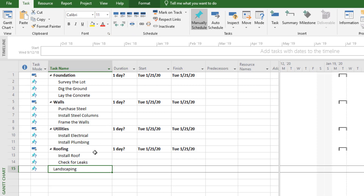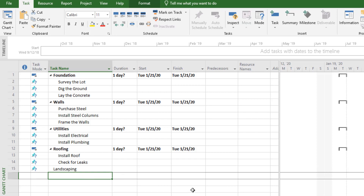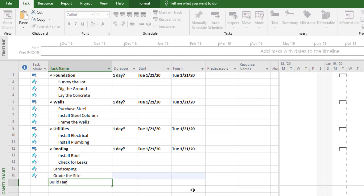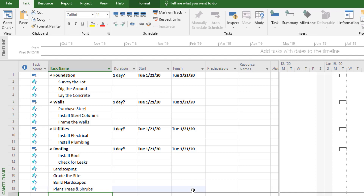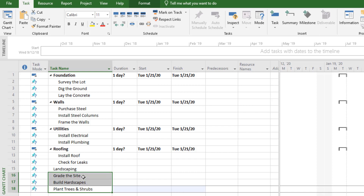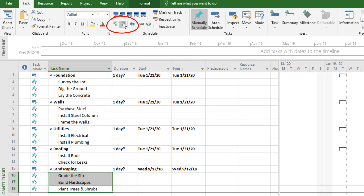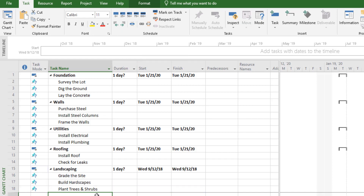Underneath landscaping, we're going to add a few things: grade the site to get it ready, build some hardscapes like some nice rock formations, and then plant some trees and shrubs. Those are now listed in their own categories, but we want them to roll up under landscaping. So we'll select those three tasks, indent them, and put them underneath landscaping so they're all together in one group. We try to group our work to make it easy to understand.